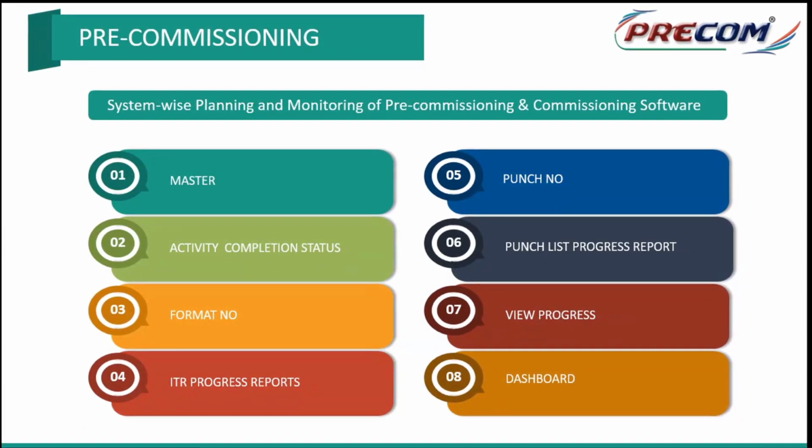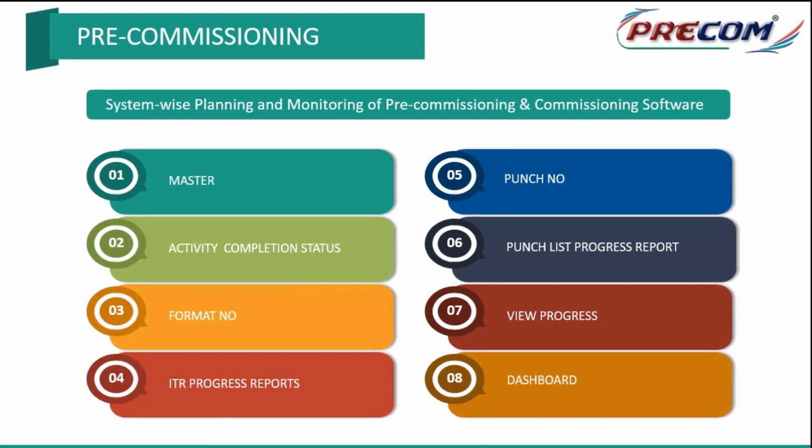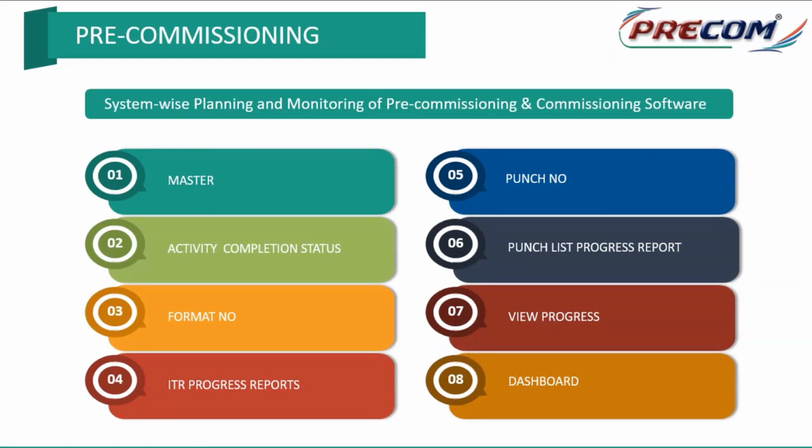Masters are nothing but, in a project I will be dealing with multiple systems, and systems are related to subsystems, and within a subsystem there may be many activities belonging to different disciplines which have to be managed. For each discipline and each of the activities or activity tags, some ITRs, inspection test reports, or certain points have to be closed for each of the tags, or multiple points or multiple reports have to be closed, which is part of the inspection test plan.